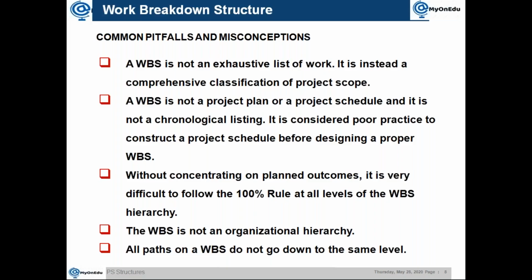Then the next thing you need to say: without concentrating on planned outcomes, it is very difficult to follow the 100% rule at all levels of the WBS element. Okay. So it's always about how you are going to break it. Always see that there is some outcome from the WBS element which you are creating. Then next, you need to understand the WBS is not an organizational hierarchy.